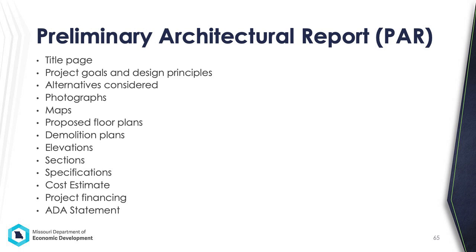If any elevation will be changed, those changes must be noted. And then sections should be provided when necessary to understand the project. You can contact SHPO to determine if sections are necessary. They may require the submission of a drawing that shows a cut-through view of the building to show the interior. This typically occurs when a project involves rehabilitation, addition, or demolition to a potentially historic property.